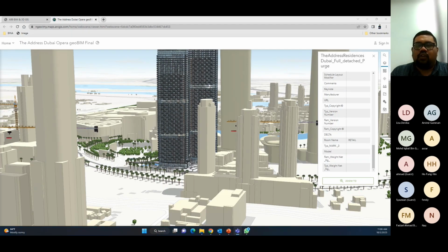If you need to complete your ground floor or your foundation, you need to start 3 or 6 months earlier to make sure all your models are coordinated, and then you can proceed with the physical work. That's why I said the main contractor must take charge of that, and the owner must also support you behind the scenes.